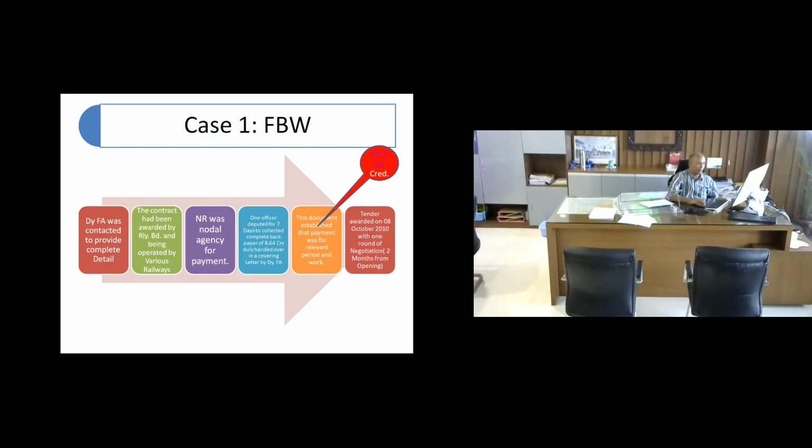So based on that, we contacted Deputy FA, and finally we sent our officer for 7 days, who got all the documents and credentials verified, and it was established that the lowest tender has done the required amount of work of similar nature. But this requires thorough consideration.